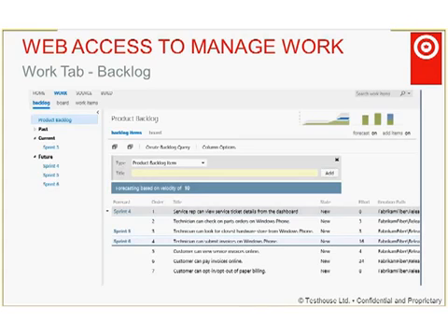It's not a pure priority, it's a mix of values appropriate to the project, so it takes into account risk and timescales, and is it required sooner or is it required later. By merging all these aspects of a backlog item together, we get an order at which things should be done, and then that begins to dictate whether it should be in the current sprint or the next sprint or delayed later.